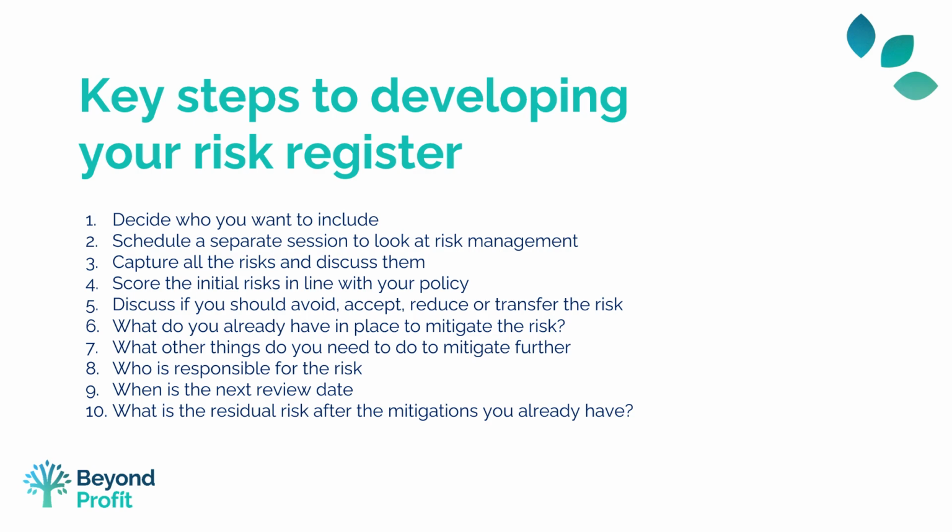You then need to decide who is responsible for that risk, and it should be an individual or a small team of individuals who actually take the ownership, and by taking the ownership they will help develop any of the things you need to do to mitigate further. And you also need to decide when the next review date is.